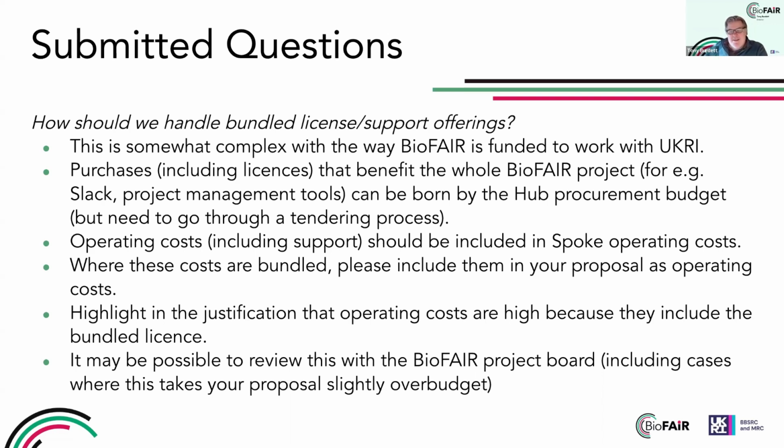And they're great for looking at project delivery. One of the things that we're interested in though is about automating and streamlining as much reporting as possible. So rather than necessarily have to ask you to report on your objectives and demonstrate impact in a written report, if you can turn some of those things into metrics that are measurable indicators through a dashboard that has a set of KPIs as part of it, we can automate as much of the reporting up to UKRI through that as possible.